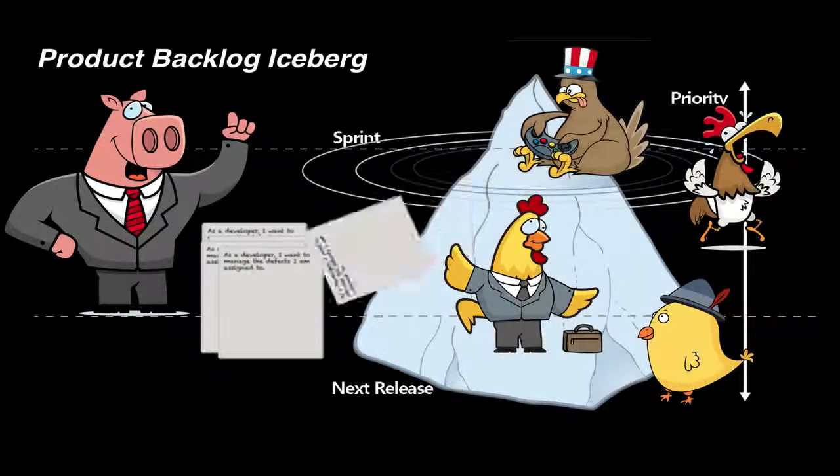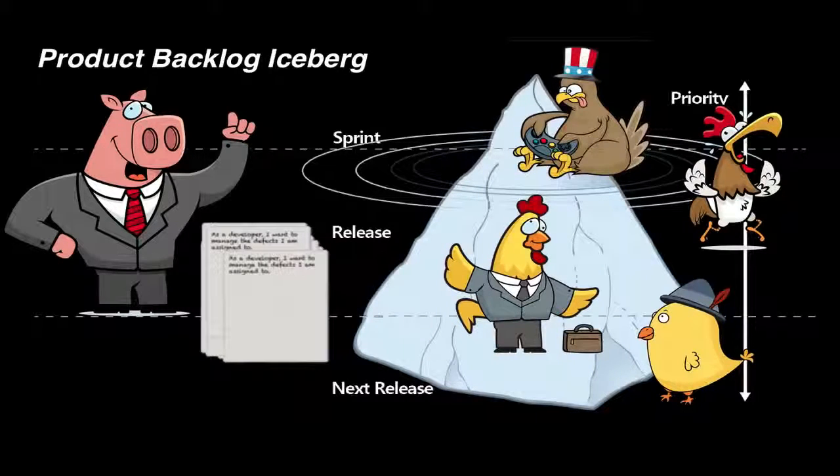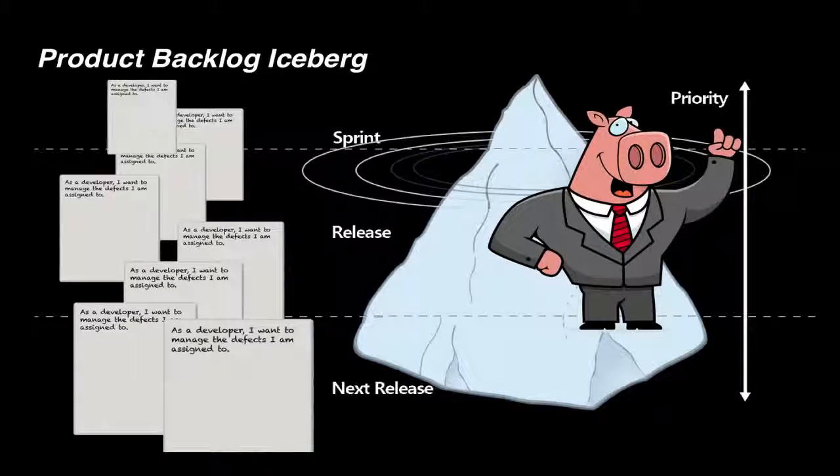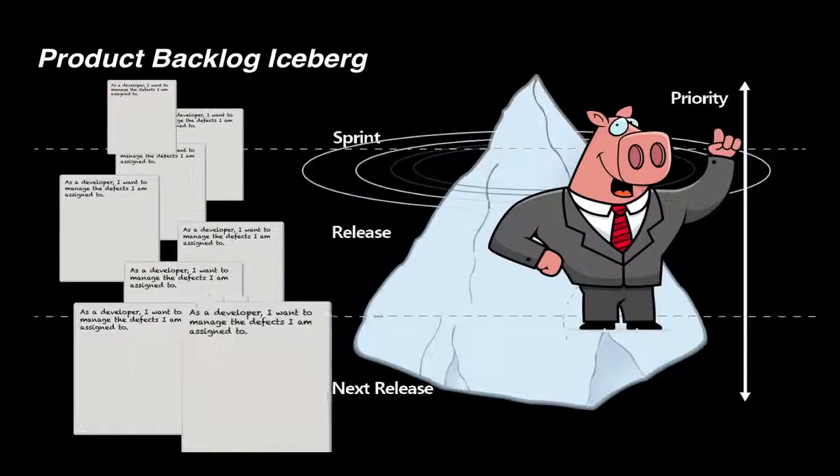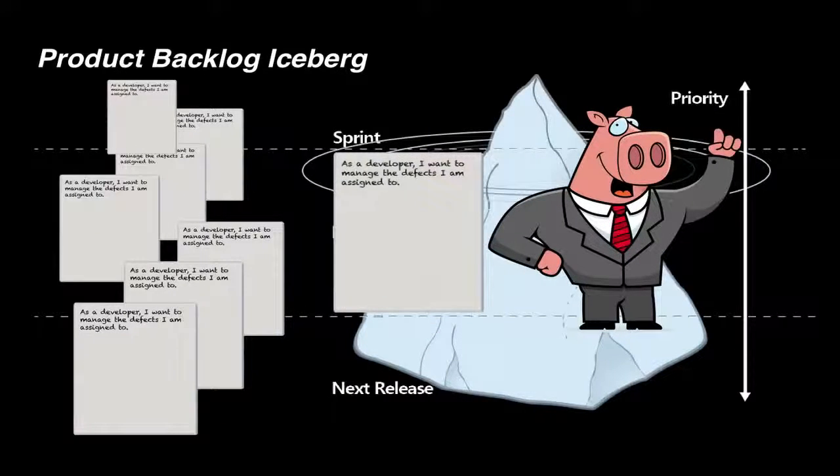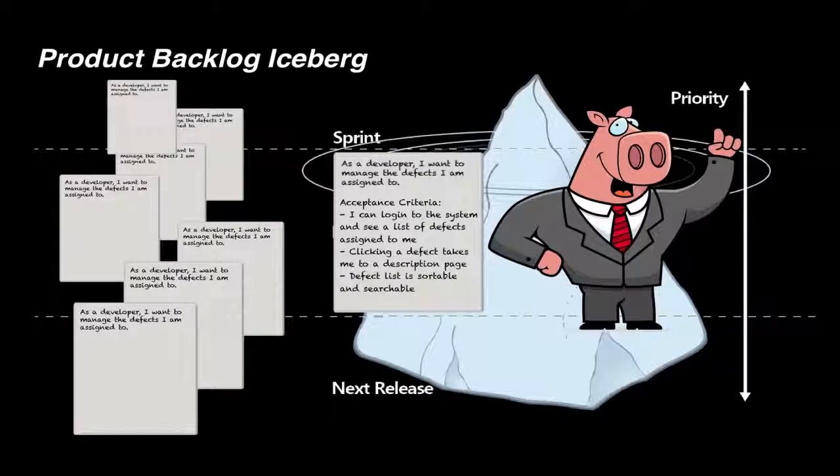Stories will usually start out as very broad general references to features, commonly referred to as epics, and then as items move up the backlog, the user stories will become more precise and oftentimes have acceptance criteria added. Acceptance criteria should be short bullet points that serve as minimum requirements that must be met before a story can be considered ready for QA.